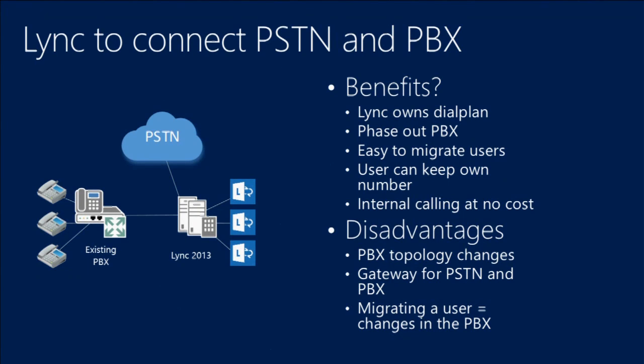And if you now think about all the different options we talked about, it really depends on what your goal is, what you want to achieve. Do I want to move away from my PBX? Do I want to keep my PBX? In this example, I would do that if I'm sure that I want to quickly move away from my PBX, and maybe I'll do this just in smaller locations where I have, I don't know, 50, 200 users, something like that. And for the larger locations, I can do different approaches. I don't need to do the same approach in every location.